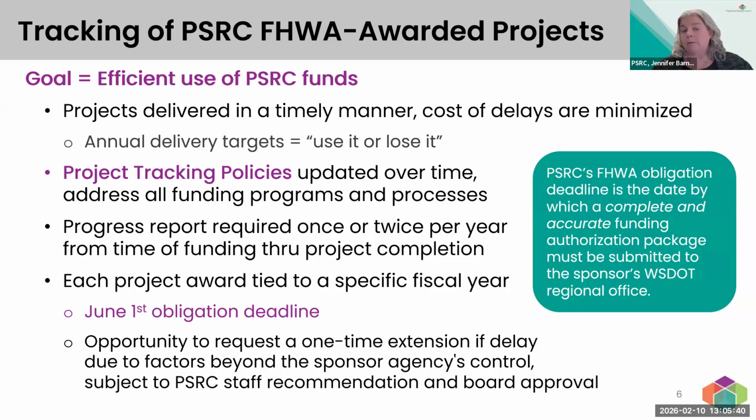This really starts from the time of award, and we do monitor project progress up until the time that the project is completed once PSRC funds are awarded. I will just clarify, we talk about our June 1st obligation deadline. All of our FHWA funds that are awarded have an obligation deadline of June 1st of the year, the program year in which they are awarded.